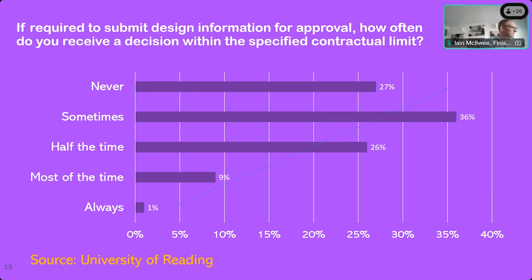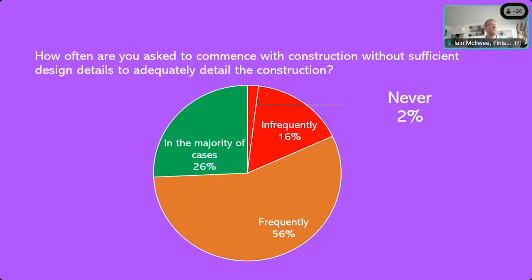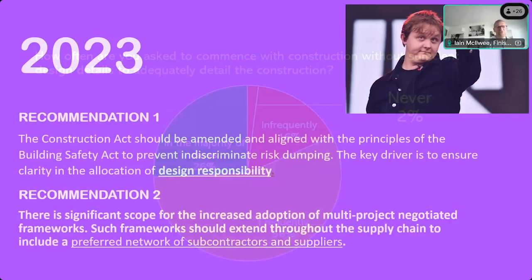I often hear people talking about the days when we had a clerk of works — but the clerk of works we miss is the 'should be right' guy who'd say 'don't worry, move on.' Now everyone is more aware of risk, the professional indemnity insurance market has tightened, and that part of our culture is under severe strain. When asked how often dry-liners are asked to commence construction without sufficient design details, only 2% said 'never' — essentially meaning: build a wall, I don't know which wall, just get on site and start building something.